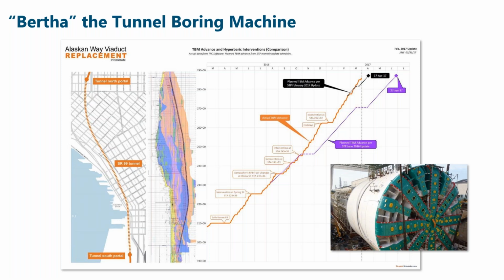And you can see period by period what the average production was. And you can see performance, you can see what happened, you can see when the tunnel boring machine broke. It's very neat. It's very clear, right? It's a planning, follow-up, and monitoring piece to make a report much better than your bar chart schedule of 1,500 activities.